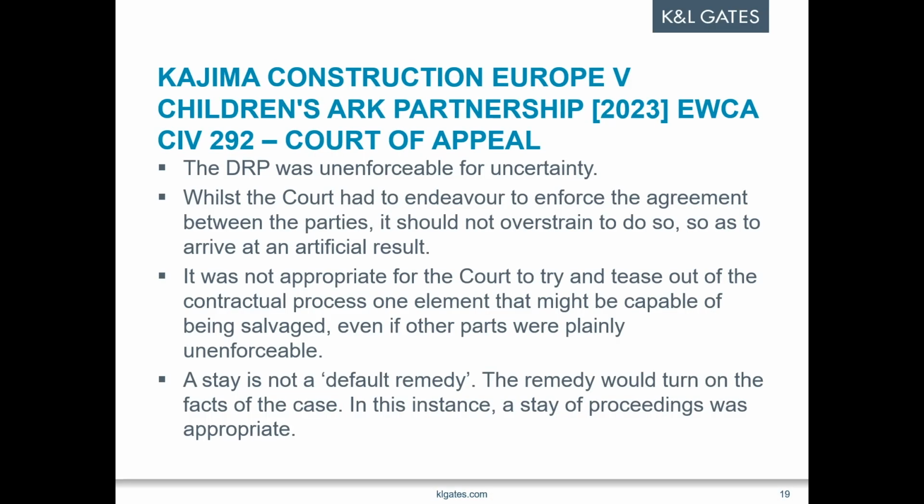This then went to the Court of Appeal, and Lord Justice Coulson held that the judge had correctly decided that the dispute resolution procedure was unenforceable for uncertainty, particularly since Kojima could not be bound by a committee it would not be represented on. He also noted there were other uncertainties about how the referral process was to be commenced and conducted. And he also stated that whilst the court had to endeavour to enforce the agreement between the parties, it should not overstrain to do so as to arrive at an artificial result.